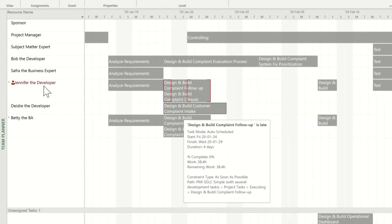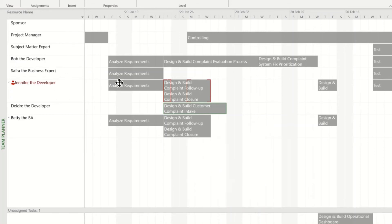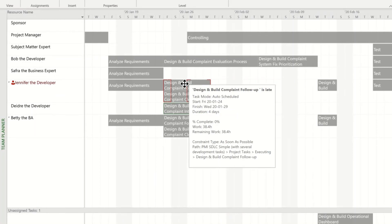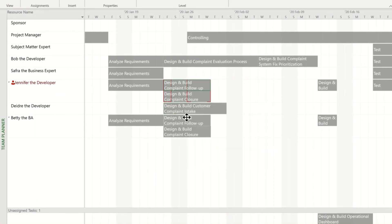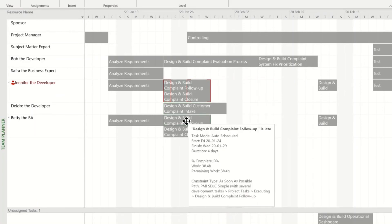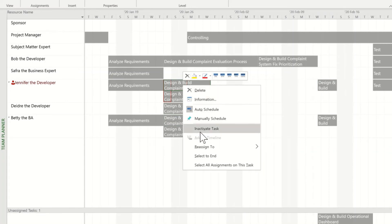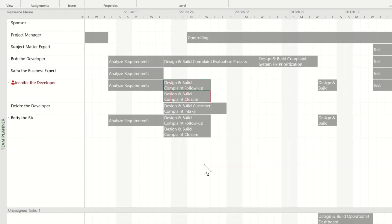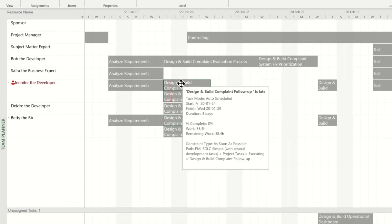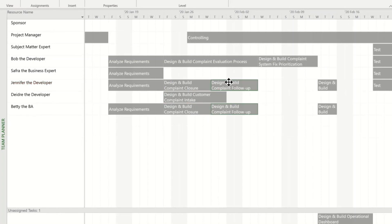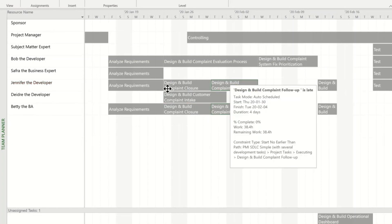Let's do the same for Jennifer. One challenge with Jennifer is this activity is also tied here with Betty being assigned to the same activity. In this case, I can simply select the activity, right click on it and select all assignments on this task. Now project selects both of these activities and I can drag them at the same time. I've solved Jennifer's over allocation.